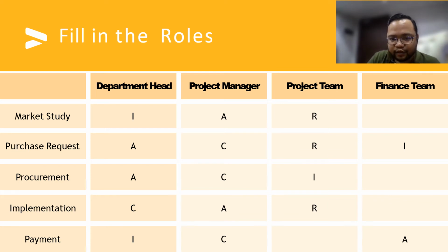Now, if we notice here, there are some steps in the RACI matrix that are unfilled. Depending on your situation, depending on the steps you identify and the stakeholders involved, there might be a situation where not every box will need to be filled because, as we will learn later on, the more that we involve people in each step and each phase, the more the process becomes complicated and it might take longer to complete each step.